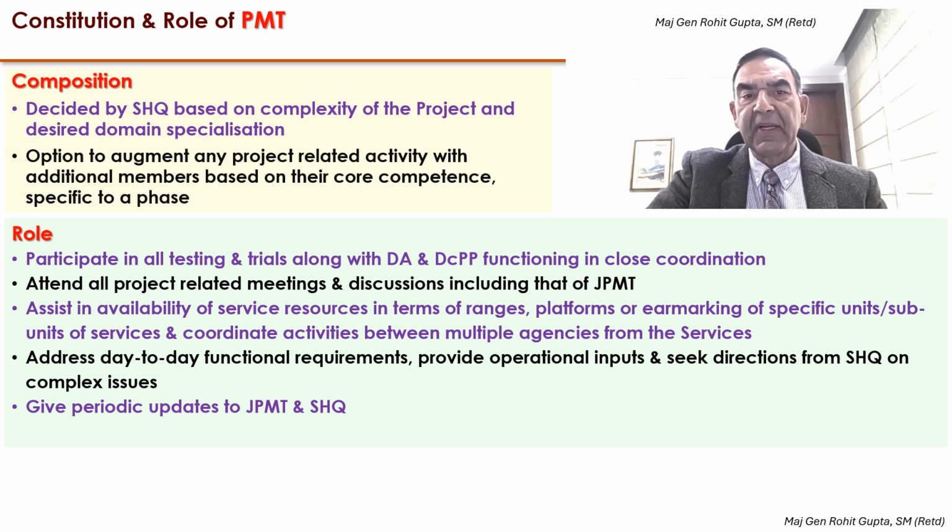The project management team. The PMT can be considered as an interface between the JPMT, the development agencies, and the SHQ. Its composition is decided by the service headquarters based on the complexity of the project as well as the desired domain specialization. It is not necessary for every project to have a PMT. By and large, because the technologies are complex in such kind of a design and development case, PMTs are nominated.